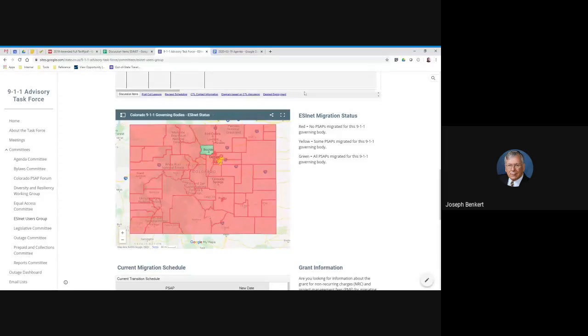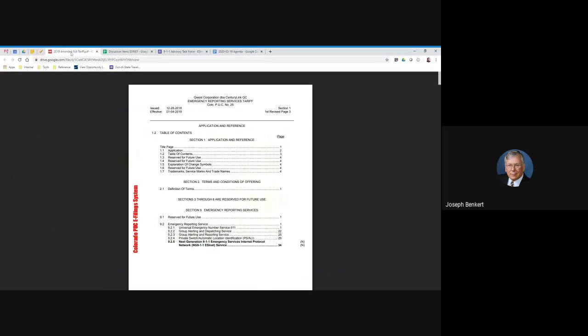So will this also affect LIDA and other authorities which have a demarc point that's not at each PSAP? It could. Now, your CPE technicians can extend that to a more convenient location for you, but the CenturyLink tech has to install it at our demarc, where our responsibility for that circuit ends.